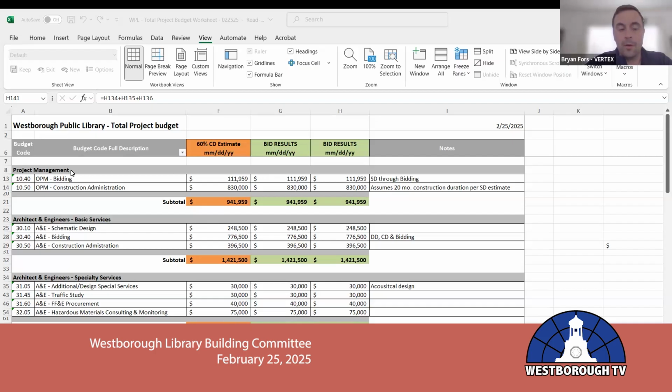So what we have is the OPM fees. This would be reflective of the entire construction closeout and warranty phase, inclusive of a construction site manager who is on site, as well as the OAC meetings and the other project management that will be going into the project. We have not submitted a proposal for this. This would come after town meeting, but a staffing chart has been put together that we would submit for review by the town prior to sending in the proposal for a contract amendment.